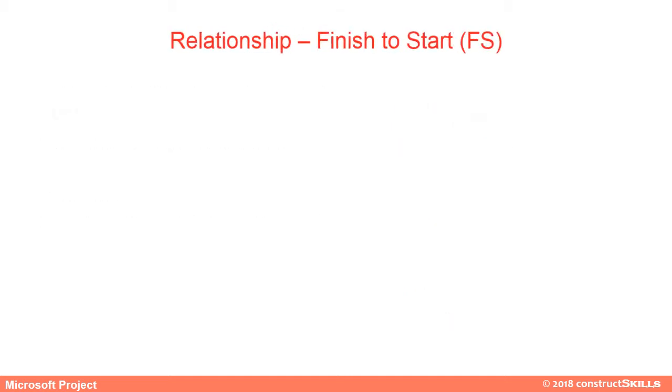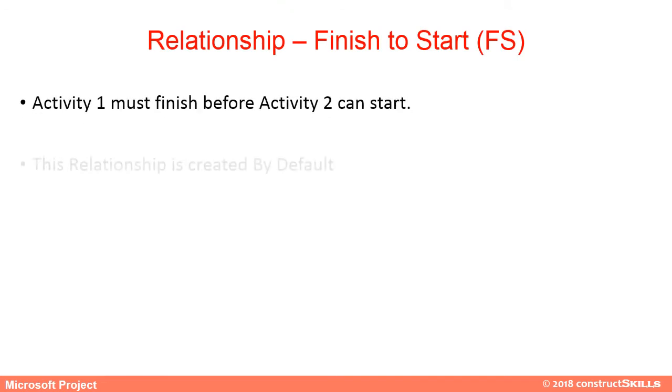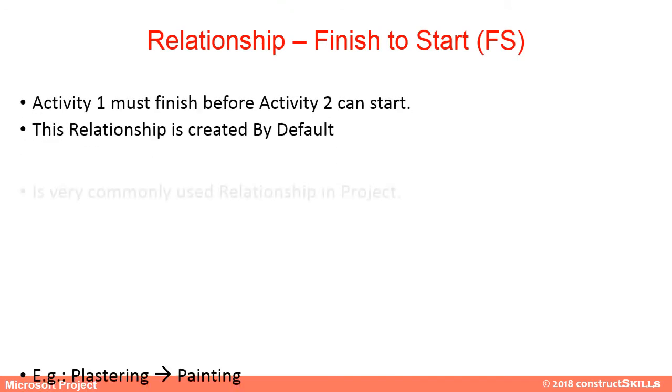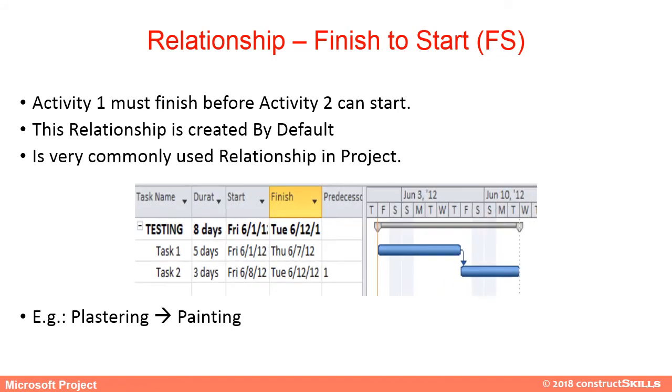Finish to Start: Activity 1 must finish before Activity 2 can start. An example is the relationship between plastering and painting.